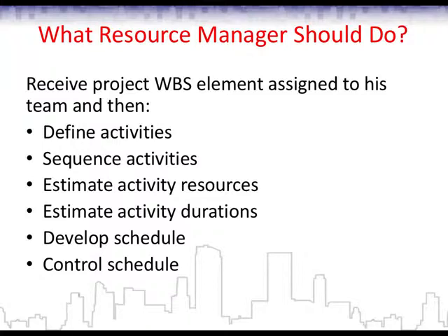And it's very typical from the PMBOK 2012 perspective that a project manager defines WBS elements. He builds the WBS dictionary, and then the elements of the dictionary are assigned to members of the project management team of the project. So these are normally the resource managers, or team leads. And then the team leads should drill down those WBS elements. They should define activities, sequence the activities, estimate the resources, estimate durations, then finally develop the schedule, and then later, over the course of the project, control it.